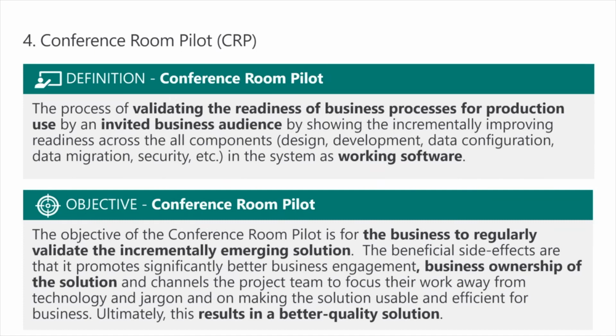What we mean by a conference room pilot is the process of validating the readiness of business processes for production use by an invited business audience. So the idea is that you show the business process first as a logical flow in terms that the business understands. So this is all in business language that they understand. And then you show them that process within the Dynamics application.